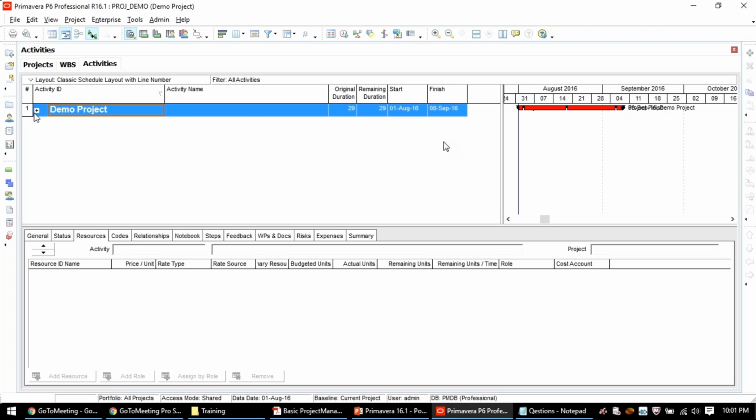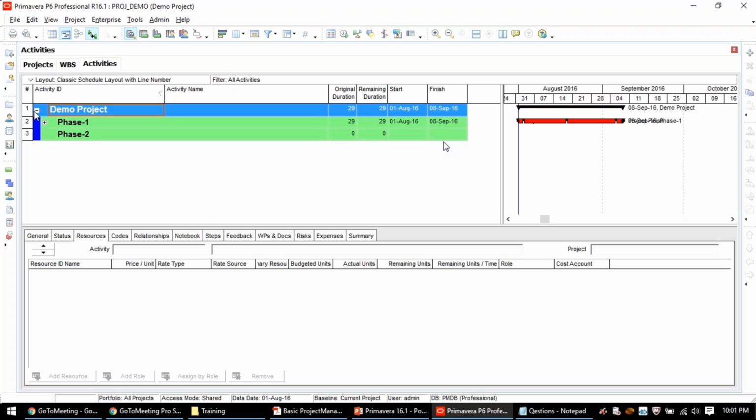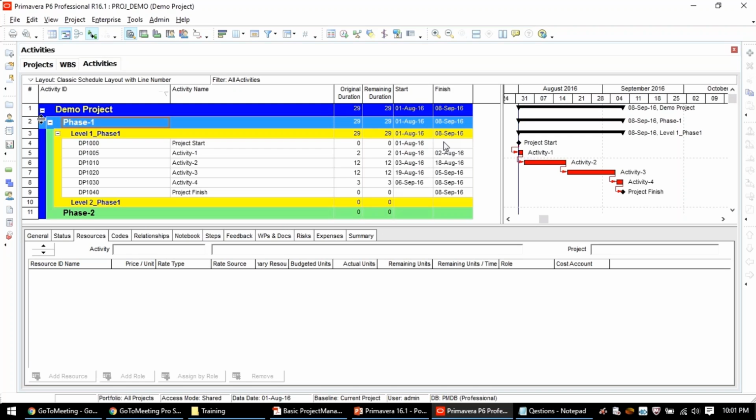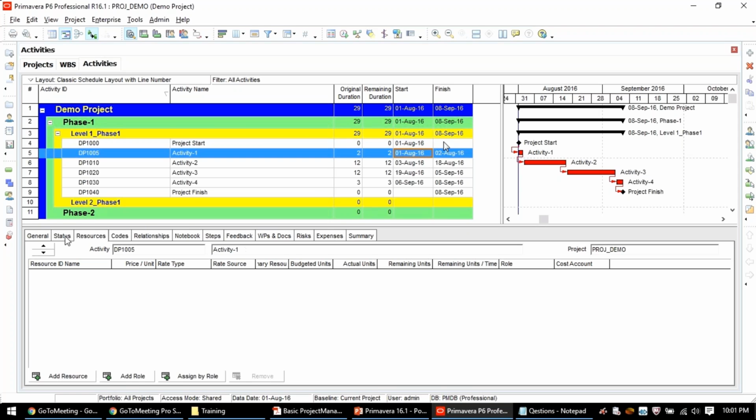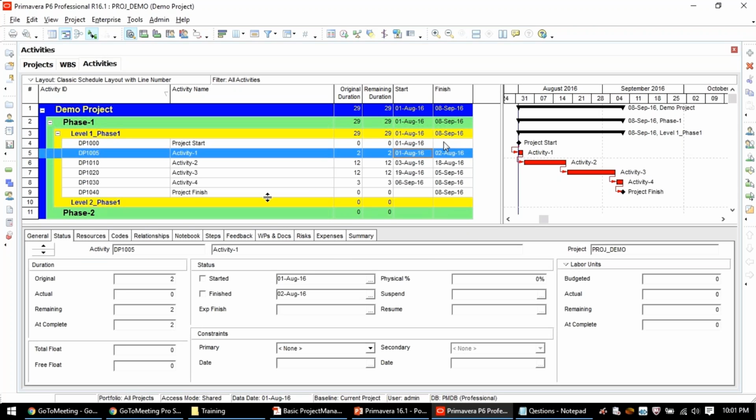After baseline, again, you start updating it. You go here, go to every activity. Maybe it may not be Samba, probably some other resource who will come, who will take this project. He will say, okay, this project 1st August. I'll go here. There is a tab called status. He'll start entering this real-time data from the daily progress report, daily activity. So the project will keep on moving.